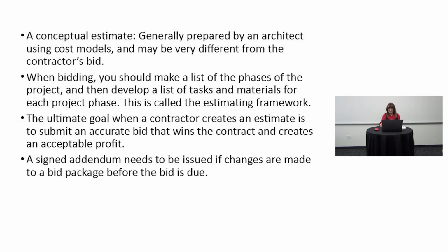That's an addendum. And depending on the size of the project, you may see 10, 12, 15 of these. Now, too many addendums during the bid process is a yellow blinking light to me. I want to be looking that company over. Who are they? Why can't they decide what they want to do before they put out their bid package? Maybe I don't want to be on their subcontractor team.